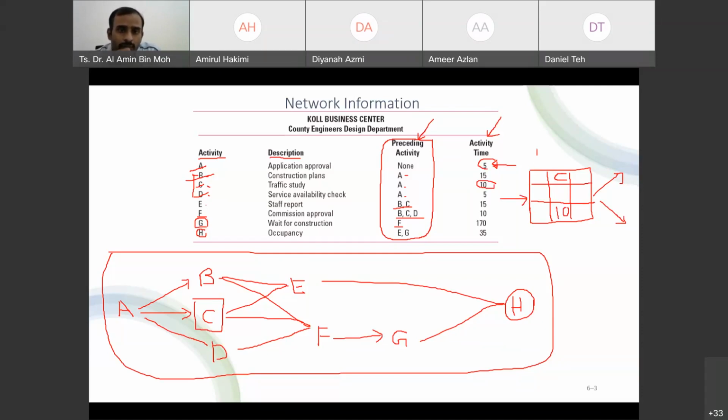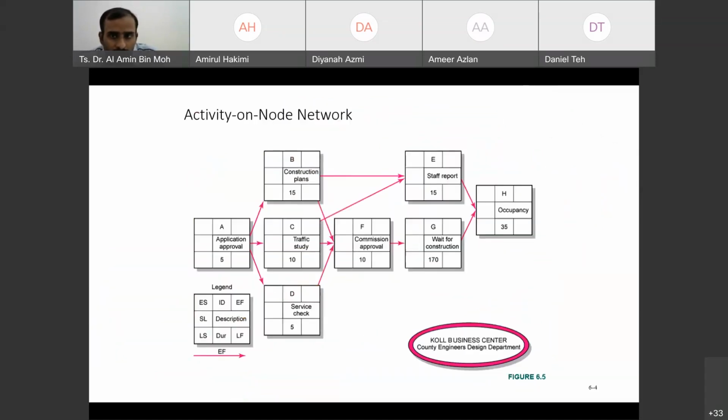So you're going to have some information here. You need to understand early start, early finish, late start, late finish in these 4 boxes. Of course, in the exam or in the assessment, this will not be given. You need to understand. And usually here is the slack of the activity, which is the difference between these two or these two. Okay, all of you, are you okay up to this point? Okay, so this is just a recap.